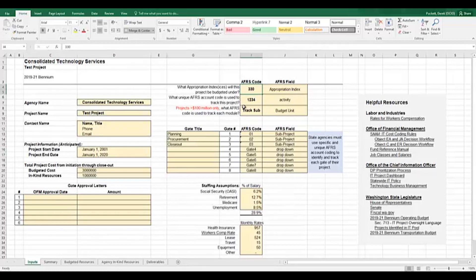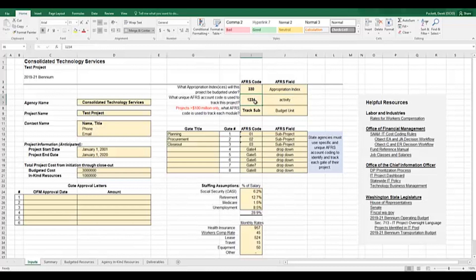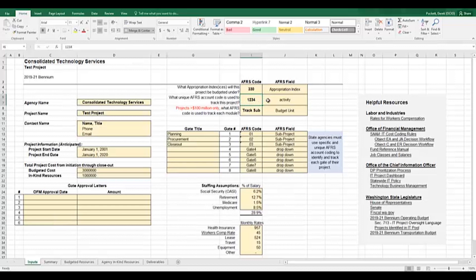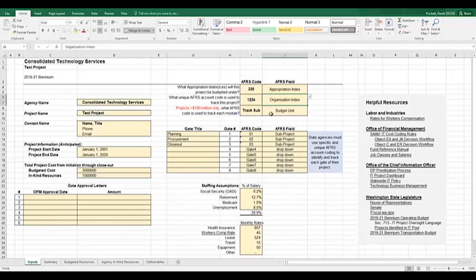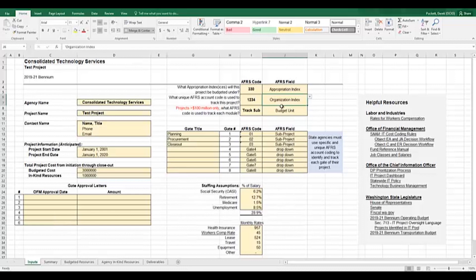Beginning in cell I4, enter the unique appropriation index if it is known for the project's costs. Next, in cell I6, enter the APERS code you will use to track costs for the project from initiation to closeout. This code should be used for the life of your project to tell the story. So in addition to keying in the value, you're going to want to select the field in APERS that that value will be associated with. So I'm going to go ahead and use organization index, which you can select from the dropdown below. When actuals are incurred against the project in APERS, all transactions need to be accompanied by whatever this code that has been identified in these cells is.